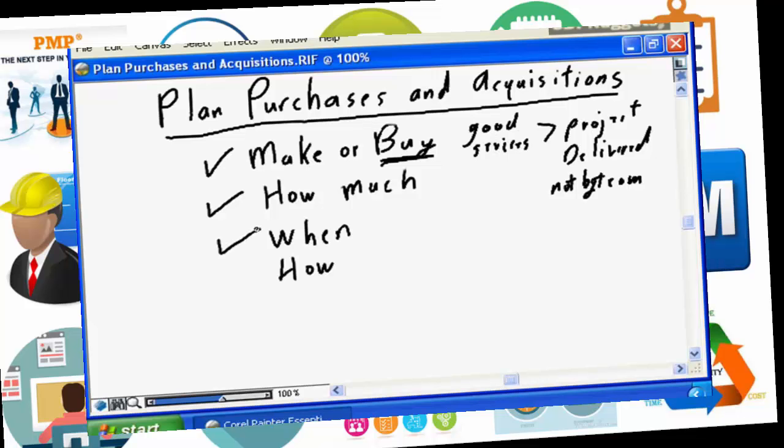Are you going to buy it on the first day of the project, the first month of the project, 6 months into the project? It's important to make your purchase decision and buy your product at the time when the project needs it, so you're not tying up expensive project capital too early, but in the same vein, by buying too late, you're causing the project delivery challenges because the goods and services required are not available in the time frame that the project team requires it.